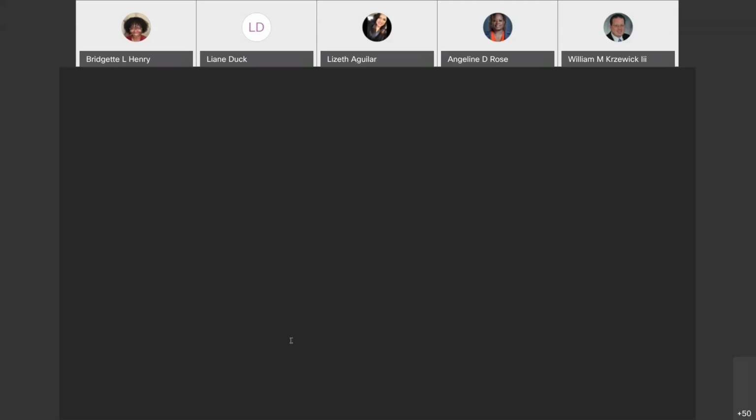Now, let me ask you the next question. What will we do next? Okay, so we're going to document the change request in the change control system first and foremost. But then what are you going to do next? And here are your options. Coordinate the changes across knowledge areas. Update the project plan to reflect changes. Bring the information to the stakeholders for evaluation and approval. What are you going to do next? Look for approval. Okay, so bring the information to the stakeholders for evaluation and approval.